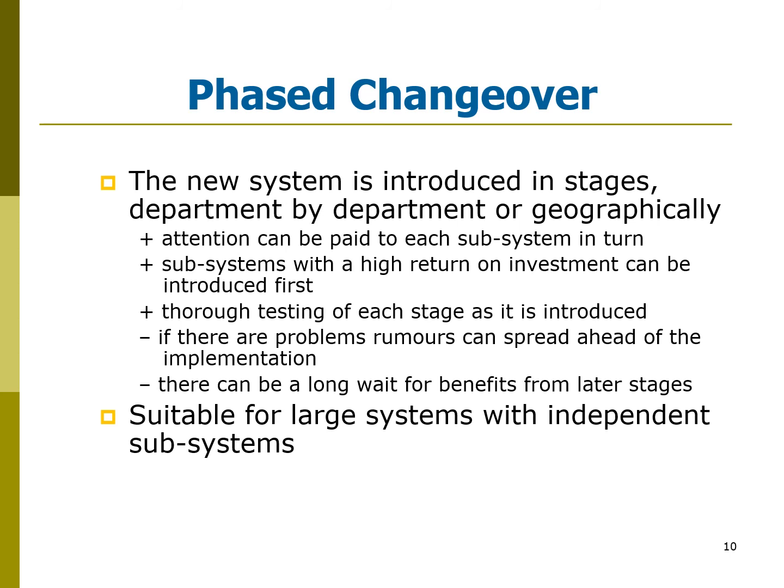So people will have bad thoughts about that new module and the entire system. And then it takes a lot of time to see the benefits because you run the first module, second module, and so on. So this kind of strategy is good for large systems with independent subsystems.